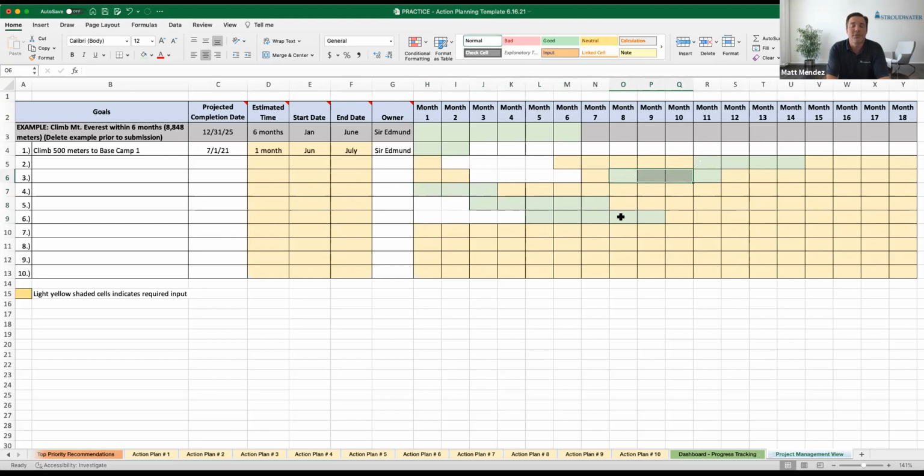Again, the importance here is that this is all around resource management and making sure that you're able to appropriately sequence your projects and not overload the organization. So I recommend going through this exercise, mapping out the entire project, and then you may want to make some modifications to your timing if you realize that you've potentially set yourself up to pursue too many things at the same time. So it's very helpful to go through this. It gives you a visual representation.